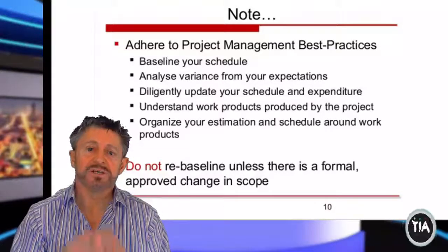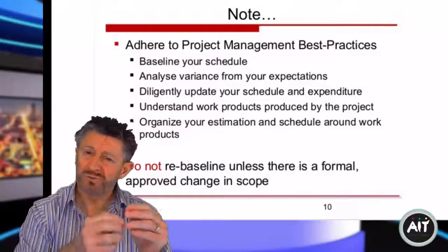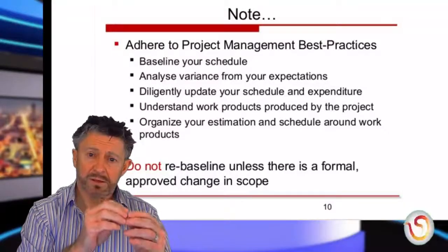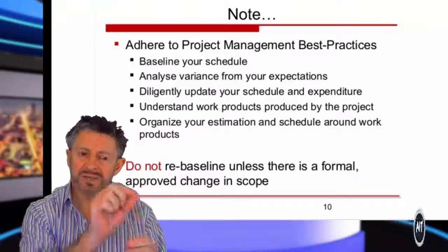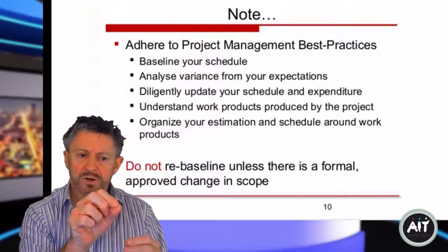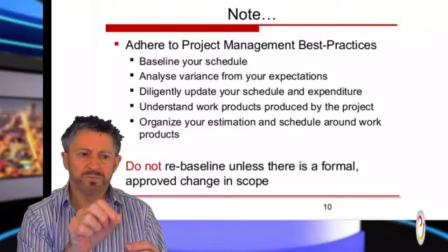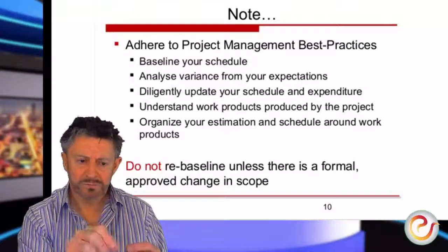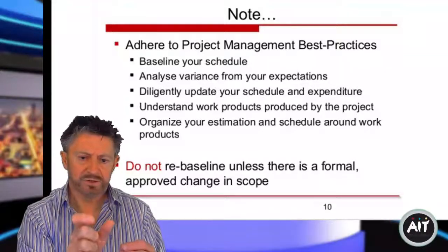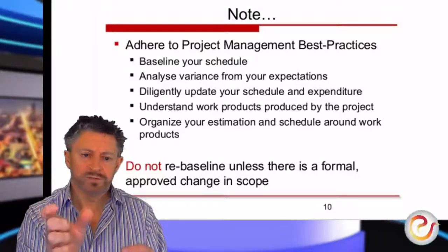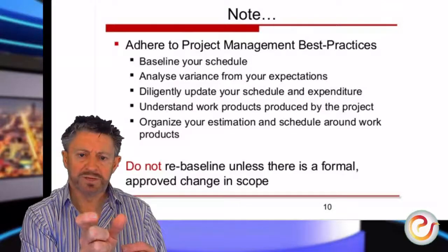And the customer says, yeah, I'm happy. So you might have to agree with the customer on what functions or requirements you want to have removed. They might say, well, no, we can't take that one out, that's critical for us. But this one is nice to have, but we don't actually need it. So we can remove that one and say, well, okay, that will save you that much time and money. But it's not enough. You want a month, we can only save maybe a week and a half here.